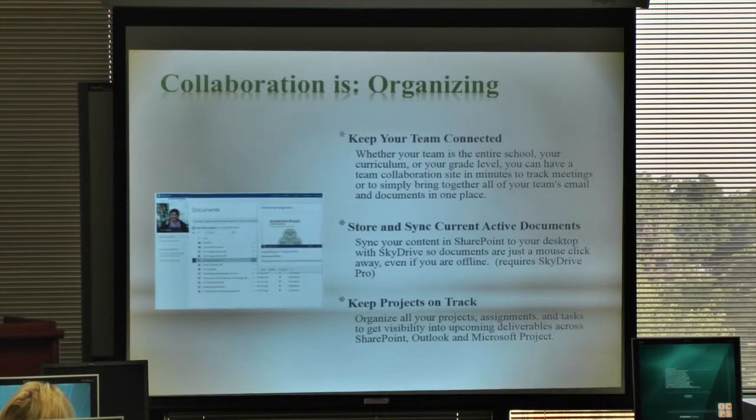And the person in charge of the entire project can then do a report online that SharePoint generates. It's a Gantt chart type report to show the status of the project and the status of all the tasks so that they can manage that project a little bit easier. It is not a replacement for Microsoft Project or Project Server. However, given that it's built in and it's free in effect, it might be a good tool to use if you've got very simple tasks or simple projects that you need to track.